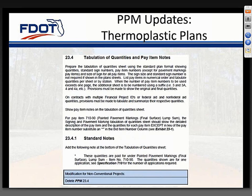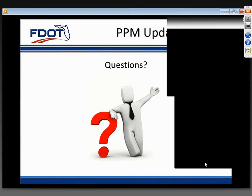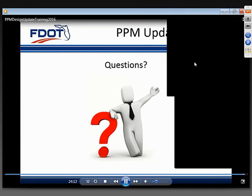Finally, in Chapter 23 of Volume 2, we removed the language related to separate thermoplastic contracts. Thermoplastic pavement markings will now be included in construction contracts. This revision impacted Section 23.1 and completely removed the old Section 23.10. That concludes this presentation on Volumes 1 and 2, with the exception of Chapters 4 and 7, which we'll cover in a few minutes. For now, we'll take a few questions.